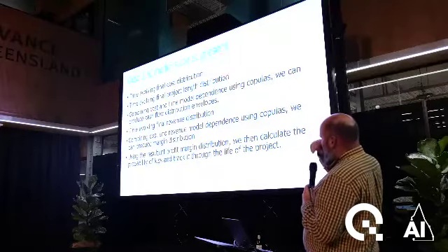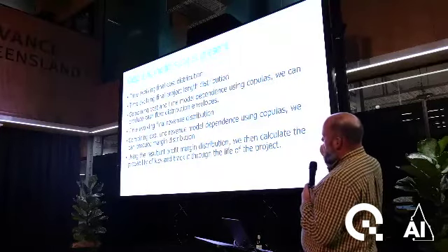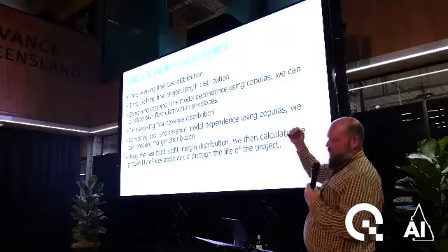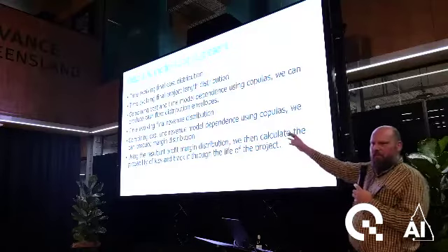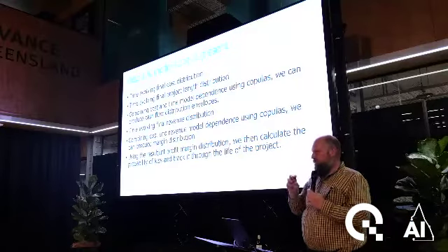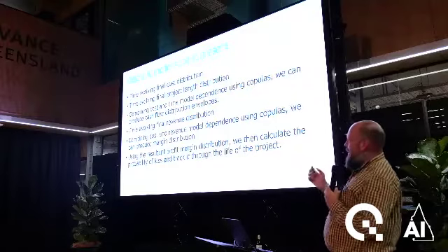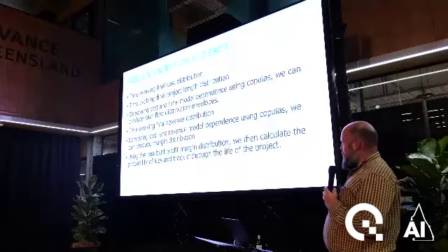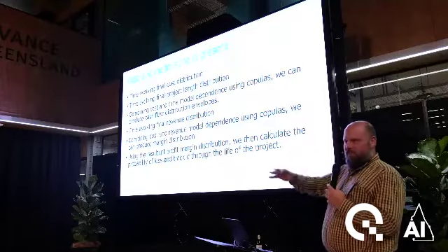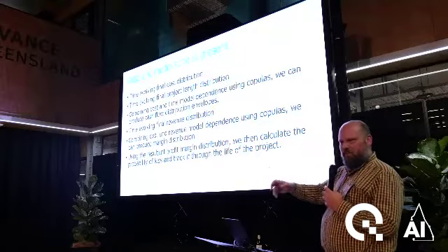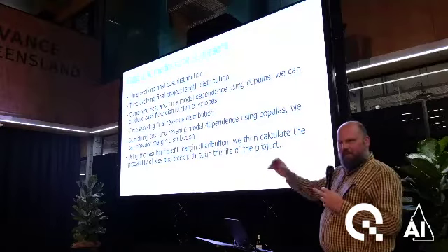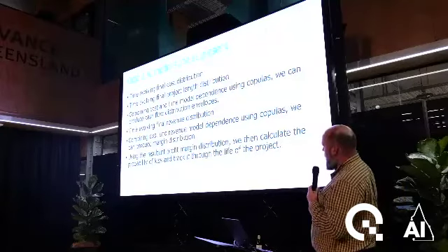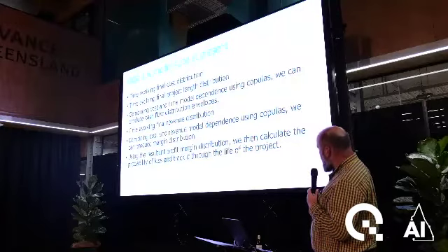Also, we have revenue models doing the same thing as a cost model. But when we look at the revenue and cost, there are correlations between them too, so we also have to use those copulas, and then we can calculate the margin distribution. What you find is the margin is very sensitive to these changes in revenue and cost. And of course, you've got these strange, very high skew, high kurtosis distributions, and they're moving around through the evolution of a project. So you can imagine the margin distribution is going to be some weird and wonderful thing going through time.